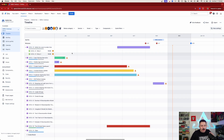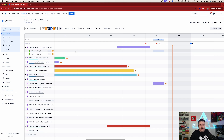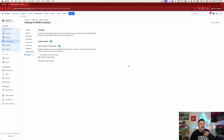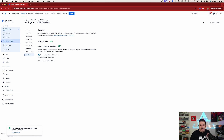If for some reason you're not able to put dates on your stories because they're inheriting values from your sprint, you can simply come over to the three dots and configure your timeline. This will redirect you, and then you can pick schedule by start and due dates or schedule by sprint dates — pick the right selection depending on how you want to schedule those stories, tasks, or bugs.